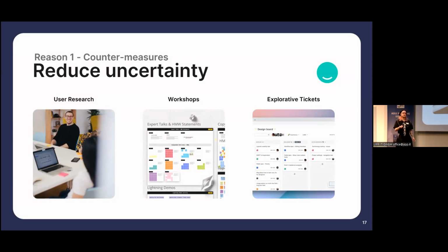And you're going to need explorative tickets or tasks. These are tickets for designed features where the feature is still pretty unclear. You don't have a clear vision of what it's going to look like. You need explorative tickets that give your designers some space to play around and work it out and get a bit messy. And these tickets are impossible to estimate. You cannot estimate this. And this goes against Scrum, where you have maybe story points or complexity for each one. For explorative tickets, it's again a guesstimate and not an estimate.